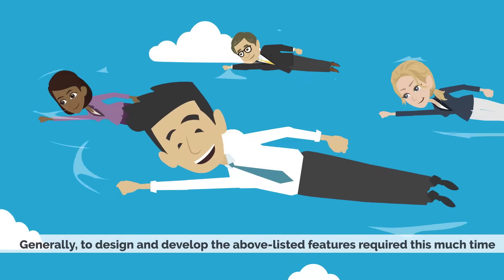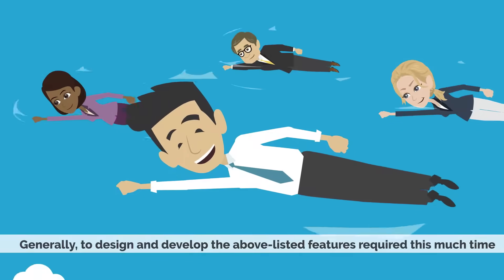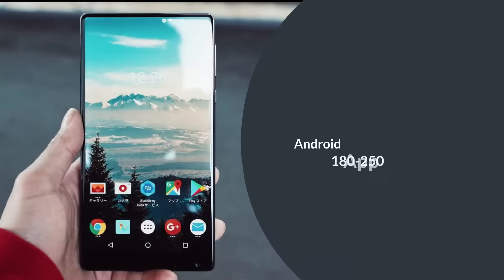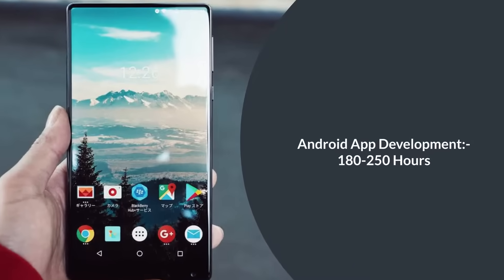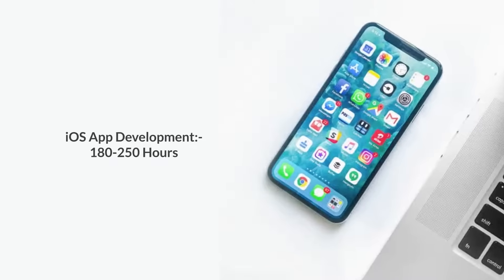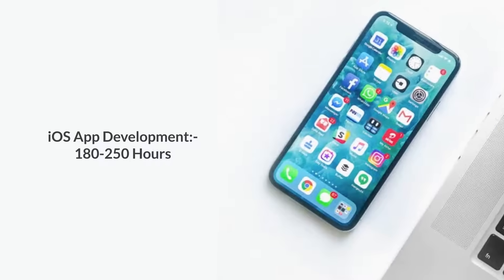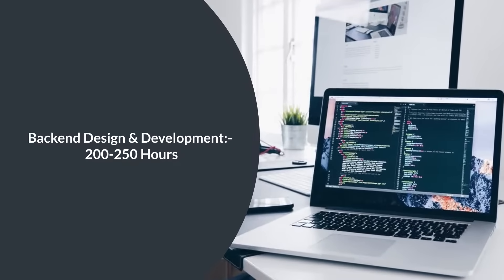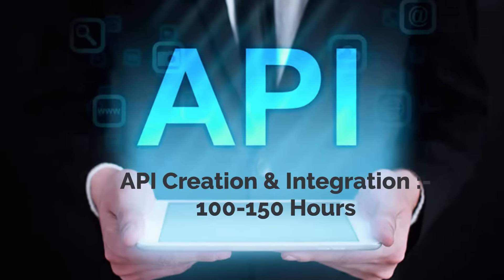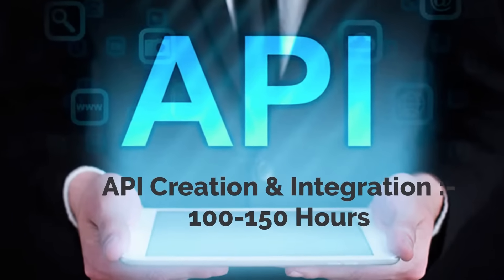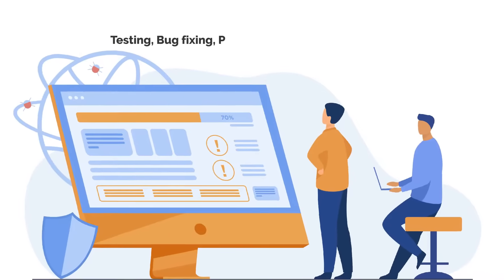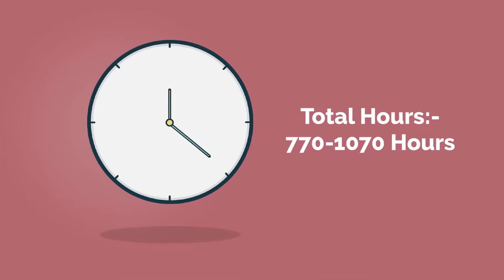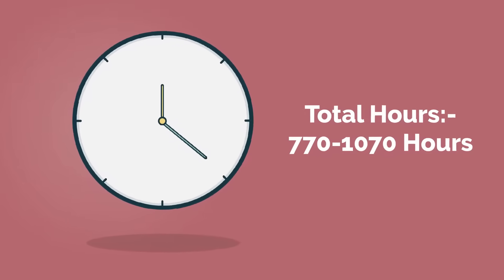Generally, to design and develop the above listed features requires this much time: App designing — 80 to 120 hours; Android app development — 180 to 250 hours; iOS app development — 180 to 250 hours; Backend design and development — 200 to 250 hours; API creation and integration — 100 to 150 hours; Testing, bug fixing, project management and deployment — 30 to 50 hours. Total hours: 770 to 1,070 hours.